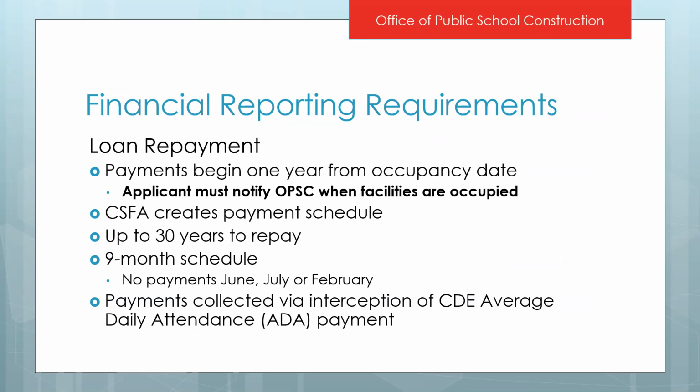Lastly, if you have taken a loan for your match, payments on that loan need to begin 1 year after you occupy the project. It is very important that applicants notify the OPSC when you occupy so that we can request a payment schedule from the California School Finance Authority. The schedules can be up to 30 years to repay, and they are 9-month schedules with no payments collected in June, July, or February. This is because the payments are collected by intercepting your average daily attendance payment that you receive from CDE.